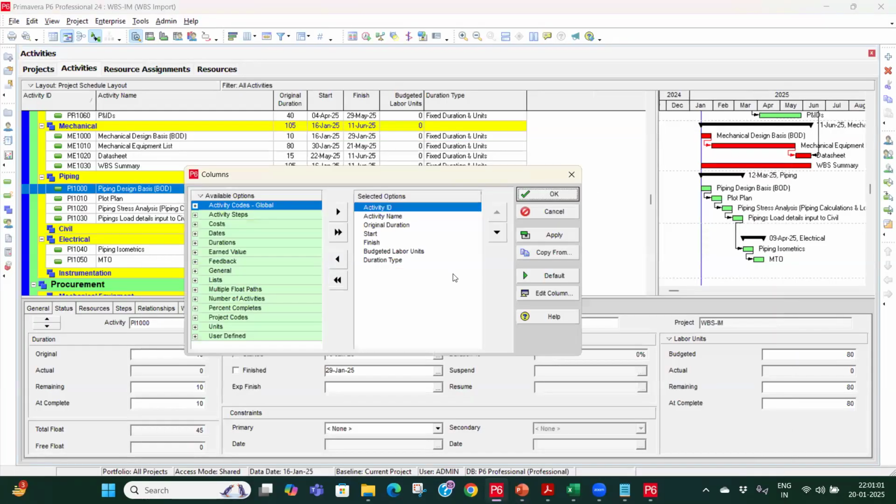So when you put the percentage, you select the unit percent complete as the default. In that case, that resource will be progressed to whatever percent you are putting. Let's say 20%, 30%. The actual units will come based on multiplying with the budget units. In this case also, you have to adjust the remaining duration.